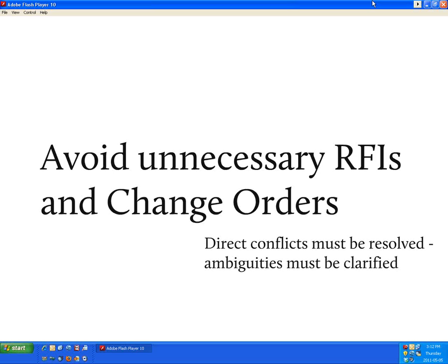Also, there is a direct cost, David. In my firm, we've estimated that the absolute minimal cost per RFI is about $250. That's the processing time, and it's one that just comes across your desk. You don't even have to look anything up. You just know the answer directly, fill it out, and send it back. But between logging it in, filling it out, and logging it back out, sending it to the contractor, there's a minimal cost of about $250. Right. And that comes straight out of the profit margin. Right. Especially if it's unnecessary.